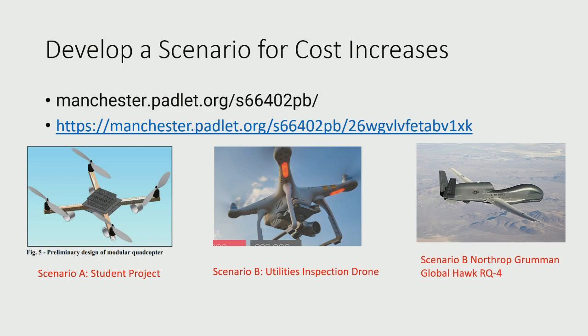And the reason for that as well is the level of complexity in the engineering, and perhaps the supply capability may cause further cost overrun, and also the one about lack of capability of people. When the two aircraft carriers were being built in the UK, there were not enough welders to do the job. There had to be some level of training to get a number of qualified, skilled welders to work on two major aircraft carriers. So political decisions are quite critical in causing cost overruns. So there are a number of fundamental reasons there.